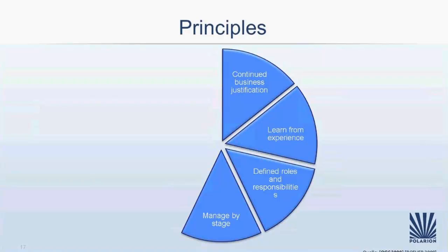So you will see it is split into different phases. In all these phases, you need to check if, for example, the business justification is still there. You need to plan them, you need to check them, and you need to control these stages. But also, you should manage by exception. So, in a project, you might define some tolerances for when you need to do something else, when you need to maybe add some more money into the project, or you need to have more users to fulfill at the end a successful project. So you need to define tolerances for when a project still can go on.